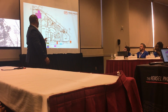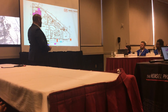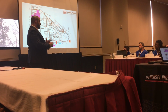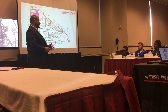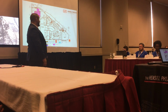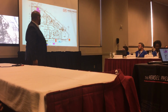We've decided to utilize the underground parking. Now we have dumpsters here. That's the area where we are going to stage the dumpsters when the driver comes to do his swap outs. Instead of having to pick it up, go to the transfer station, come back, he could just switch it out on site and save him and save us time. And we don't have the luxury of having a bunch of dumpsters on site, so we figured that would really help.